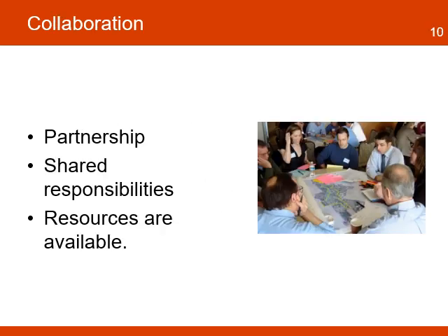The next level of participation is collaboration. This is a situation where the project and key stakeholders have a commitment to work together in a close partnership, where all parties involved have shared responsibility for the success of the project. This level of participation is best when the project does not have a good understanding of the context and needs local expertise, and the project has the resources to invest in this type of participation.